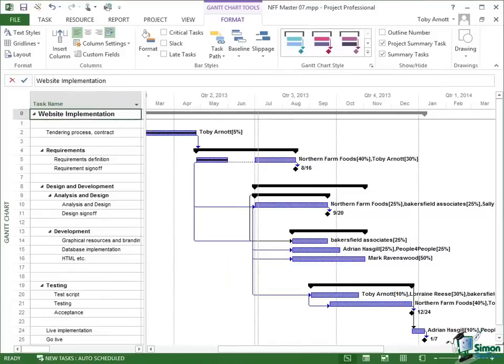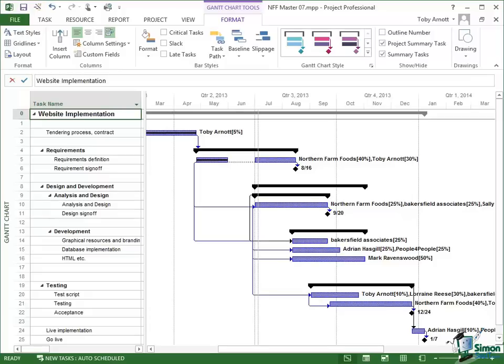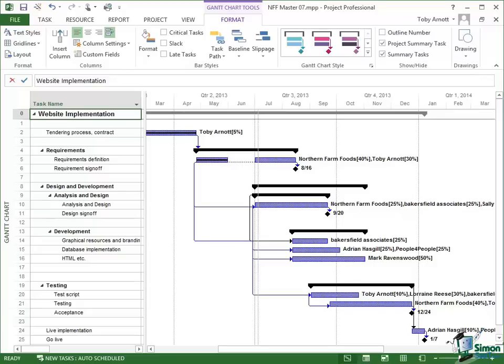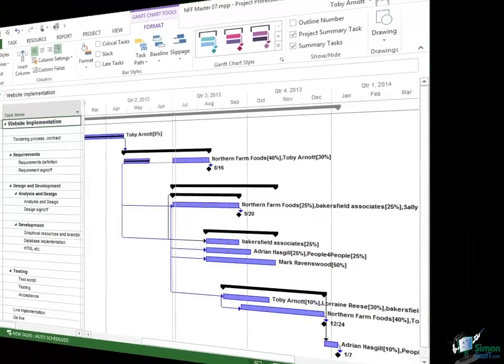The second requirement which is closely associated with that one is that you've actually saved a baseline. You are going to be using comparison with baseline figures. At any point in time I may decide to save a new baseline, either an additional baseline or one to replace the original because I may decide that my reference point needs to change to a new baseline. That's absolutely fine but you do need a baseline and at the moment I'm going to stick with the original baseline for the project overall.